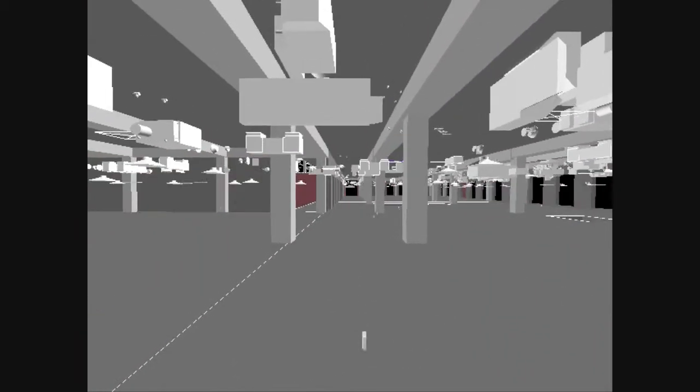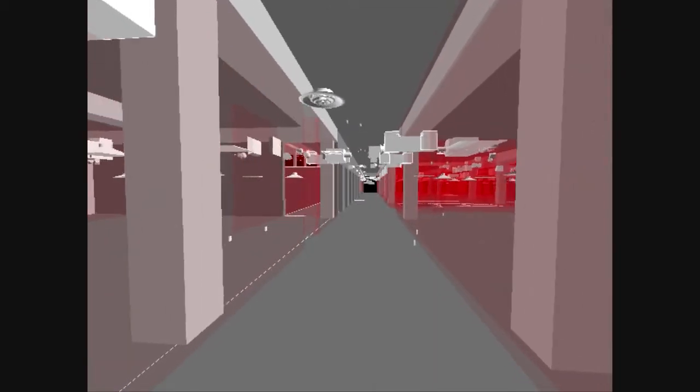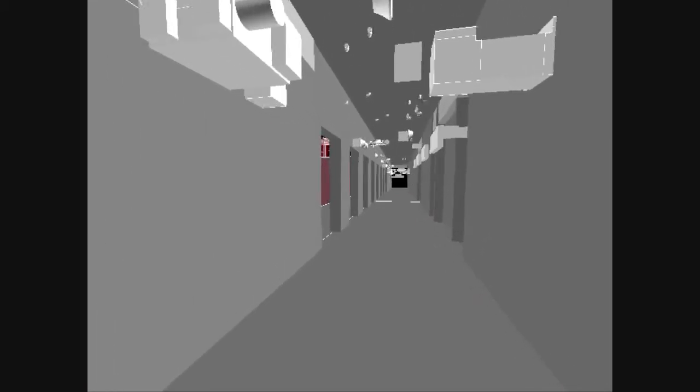Clash detection can be extremely beneficial in this process. Skanska is able to use BIM software to detect clashes between MEP systems, structural elements, and architectural elements of the building and correct them before construction even begins.